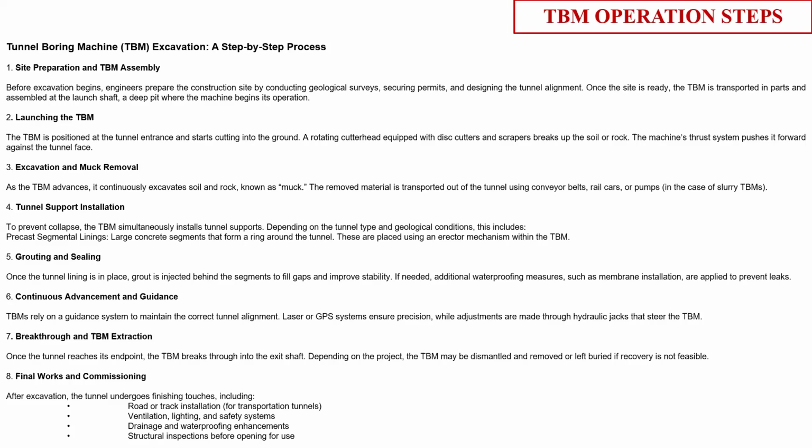Now, once the TBM operation is completely finished, your TBM has been recovered, all your backup units have been removed, and all your segments are in place, then we go for a regal survey. Regal survey means you check the alignment of the TBM, and you check where there are deviations of the segments. Because every segment opening, suppose it is a 5.5 meter finished diameter of the TBM, has certain tolerances. Every structural part has a tolerance. So if you see here,